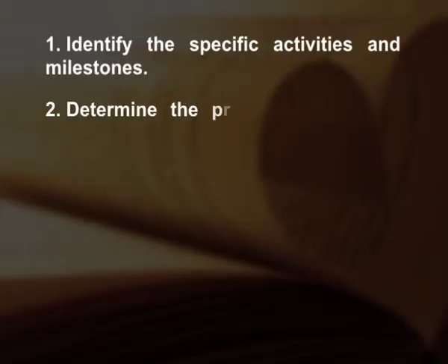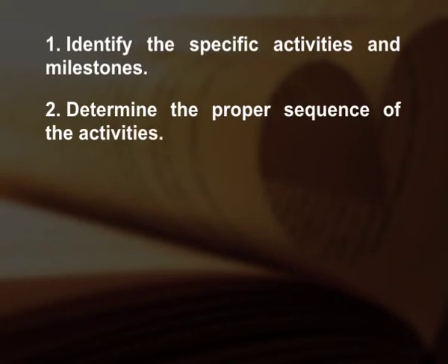on sequence and duration. Determine the proper sequence of the activities. This step may be combined with the activity identification step, since the activity sequence is evident for some tasks. Other tasks may require more analysis to determine the exact order in which they must be performed.